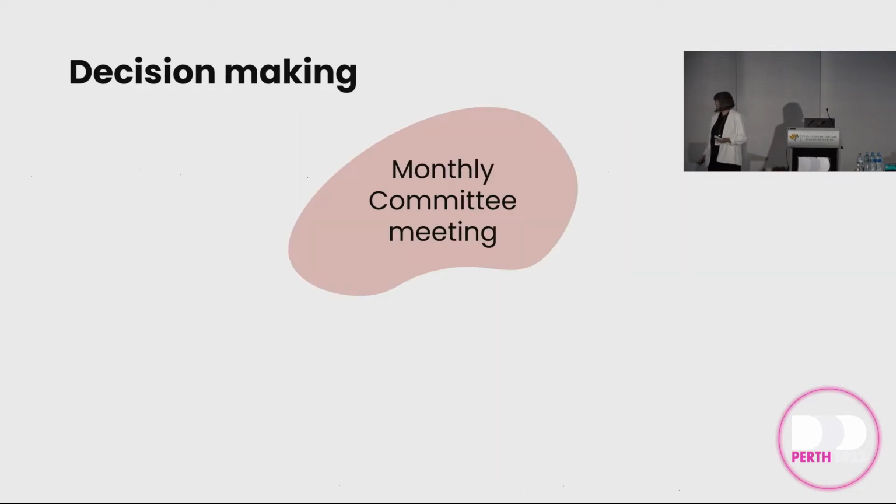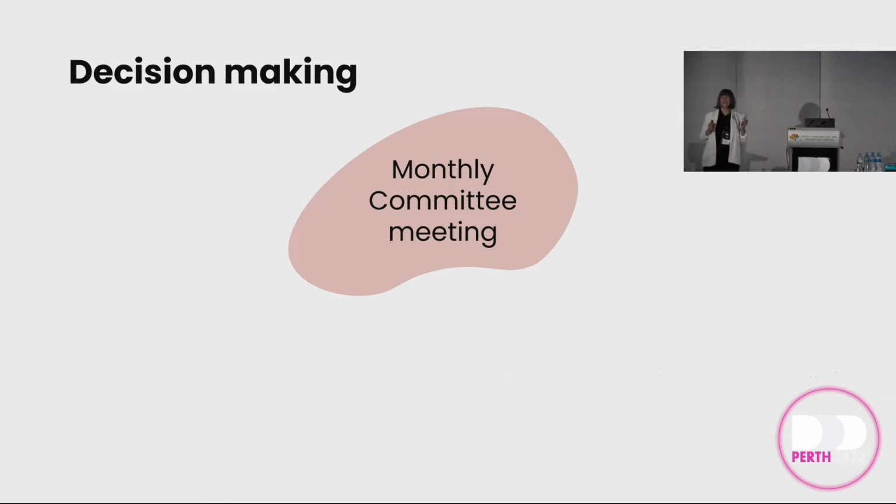So the next theme is around decision making. We've got a committee, yay! Once a month we can get a decision. And they want this to be agile. Hello, this is not going to happen, right? Once a month, board decision. And what's worse, we all know that with committees, invariably they don't make a decision straight away. So it might be 2 months before you can even get a decision, or 3, even worse.